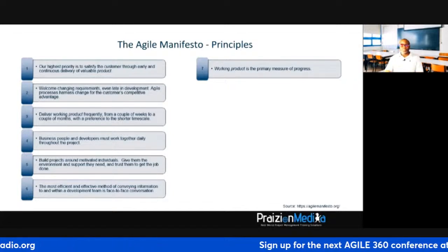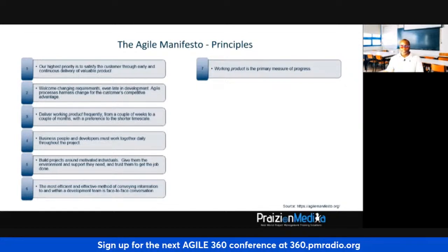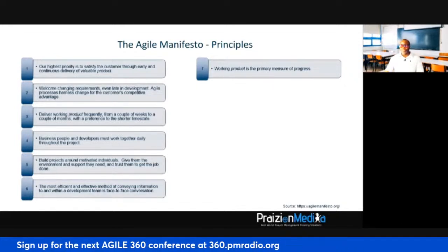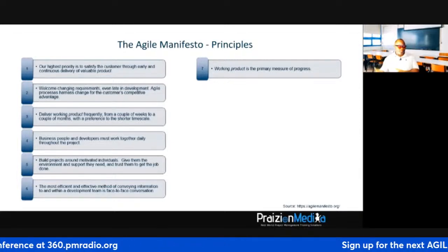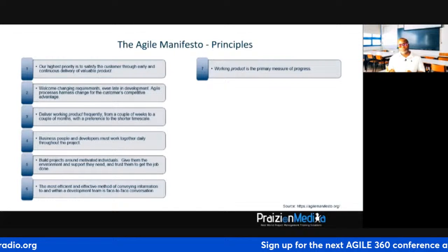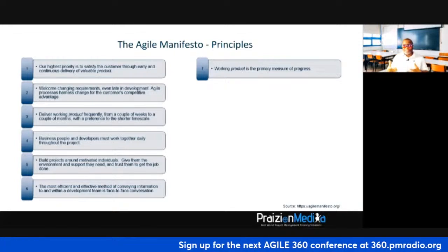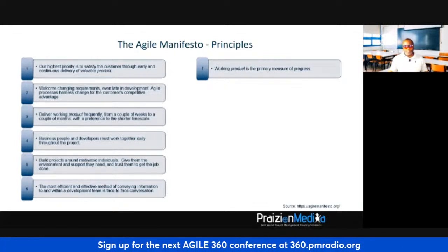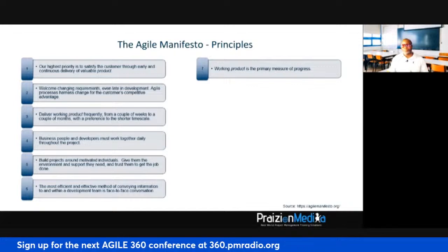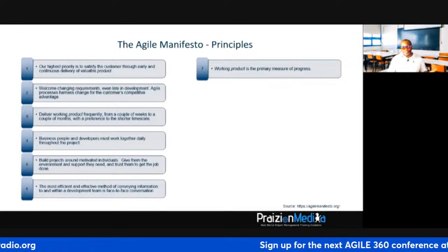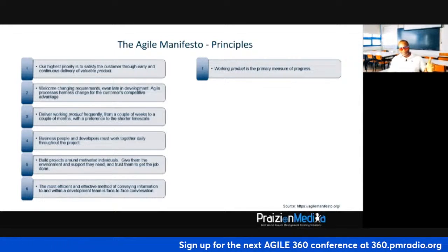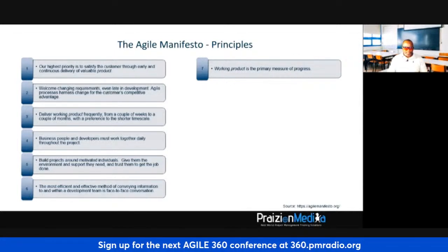Besides, the way it works in a lot of Agile shops these days is as you're working, there's a software application that is keeping record of how many things you're doing, when you started, when you finished. So if anyone really wants to know an overall idea, they can go into the system and look. But it's not percent complete. It'll just show you things like completed versus committed. How many did you commit to? 50. How many are complete right now? This amount. That kind of thing.